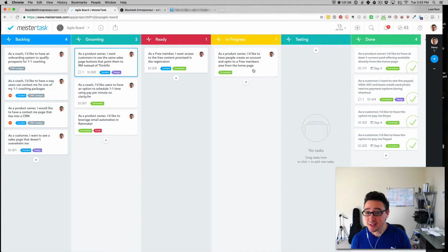The great thing about this is managing your work in progress. Too many times people don't know what they're working on because there are too many things they're working on. I can tell you right now by looking at this board, this is the one thing I'm working on: as a product owner, I'd like to have people create an account and opt into a free members area from the homepage on my website. I can make sure I focus on getting that done, and when it's done, test it and then move it to done.